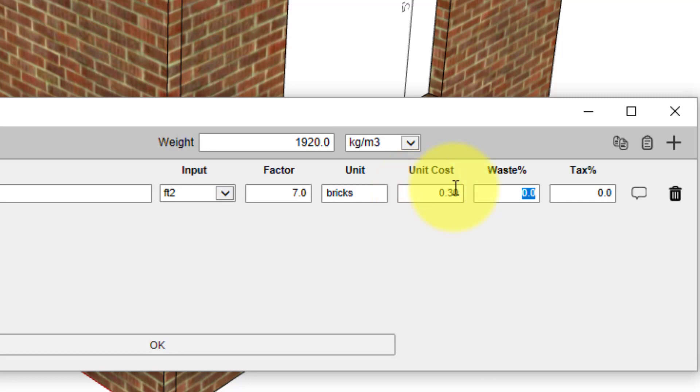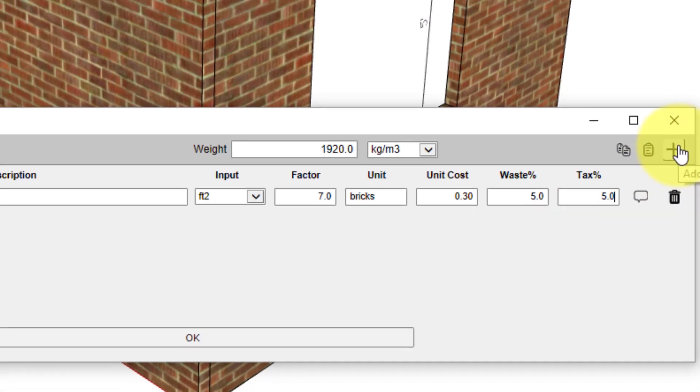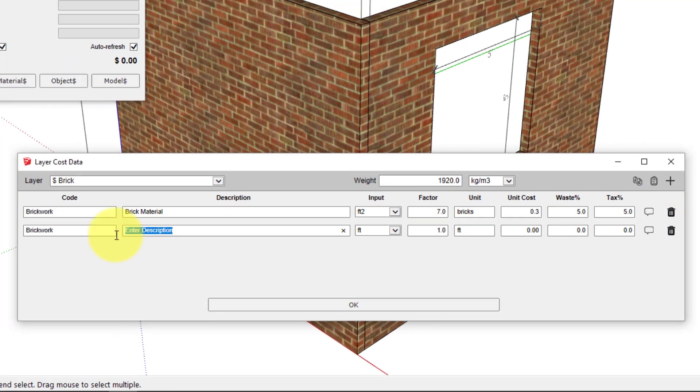The waste percentage value is used as an allowance for extra material that you might need due to cutting or general wastage. We're going to add a 5% waste factor and 5% tax. We're going to keep adding more line items to account for different costs.